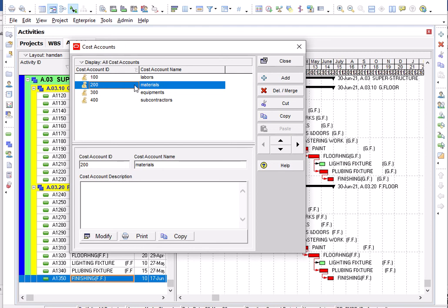But we put this in labor, materials, equipment and subcontractor so decision makers can analyze the cost of any category. For example, for laborers, they know how to employ laborers, how to move one from site to site, whether to add more laborers, or to withdraw any labor that does not work well.